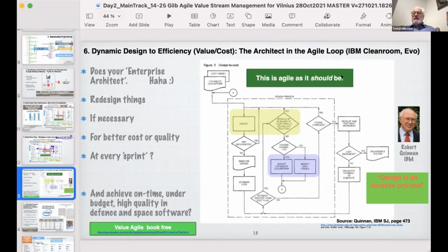This is the agile I described in 1976 in the Software Metrics book, which measures at every step and reacts at every step. If it's a failure, go back, get new. So what they're doing here, long story short, you can analyze this flowchart of theirs in your own time. But at every step, they ask, did we get the availability increase we were expecting from this step? Yes, no. Yes, good, move on. There's a second question. Did the step only cost 1 month? No, it cost 3 months to get the availability. Aha, we have too costly an architecture.